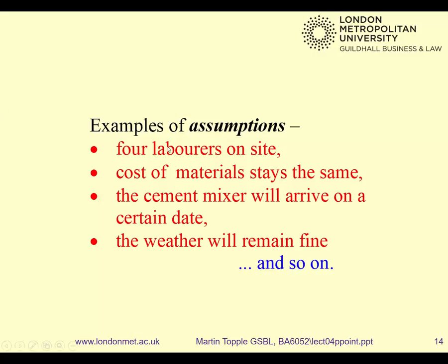The contractors will probably decide how many labourers are on the site, and they might vary it day by day depending on their own particular problems and other projects that they're dealing with. But we make the assumption in our project plan there'll be 4 labourers on the site every day. And that's how we come with a feasible finish date. We also quite often make this second assumption: the cost of the labour and the cost of the materials remain the same. And on a fairly short project, of course, that's not controversial.